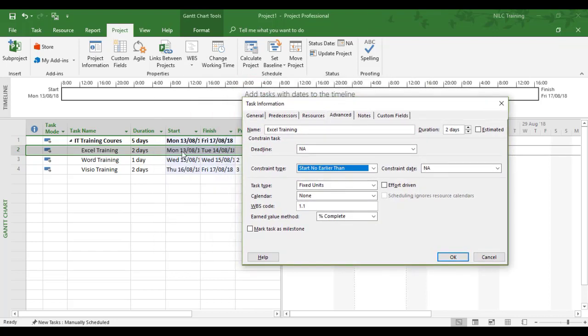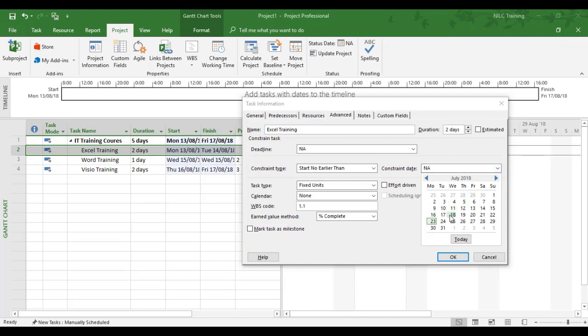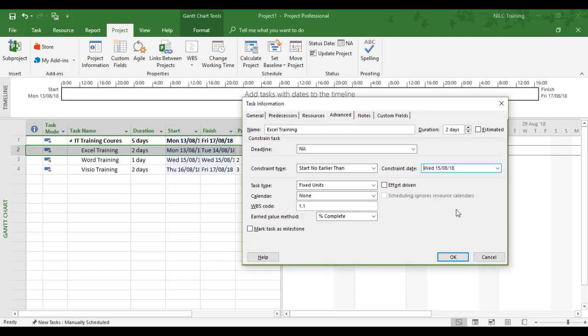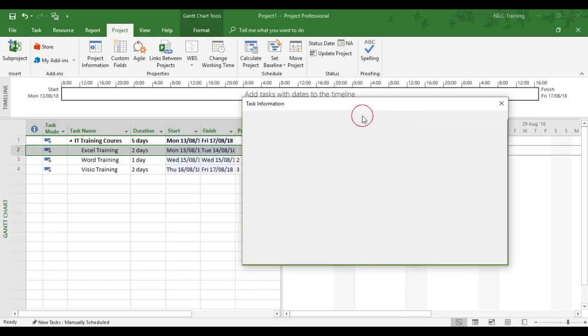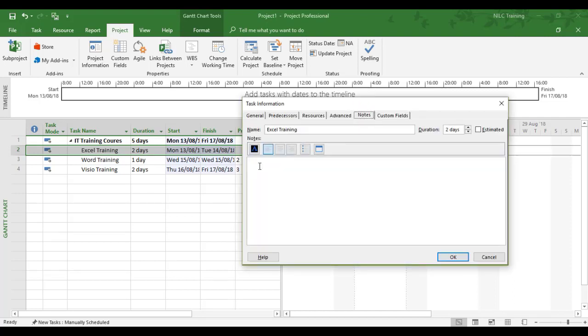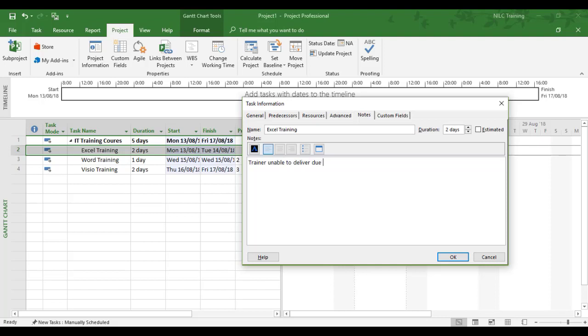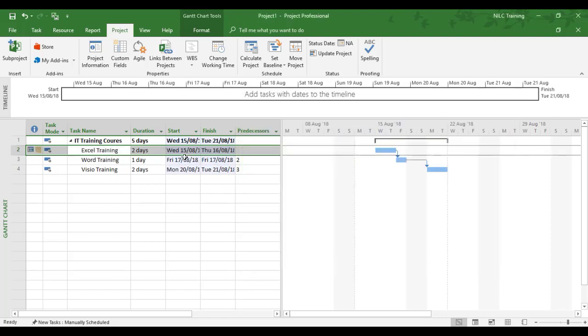From Monday the 13th to Wednesday the 15th—we want Wednesday the 15th of August. I would advise to add a note for any constraint so you know the reason. We'll put 'trainer unable to deliver due to sickness or due to illness,' and click OK.